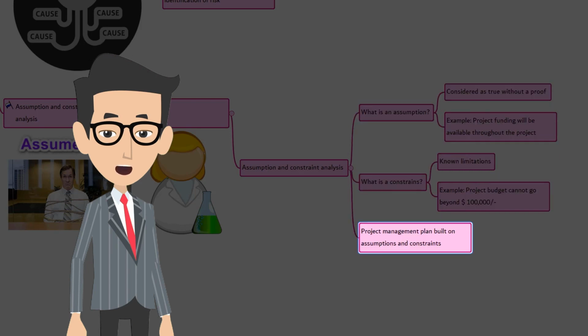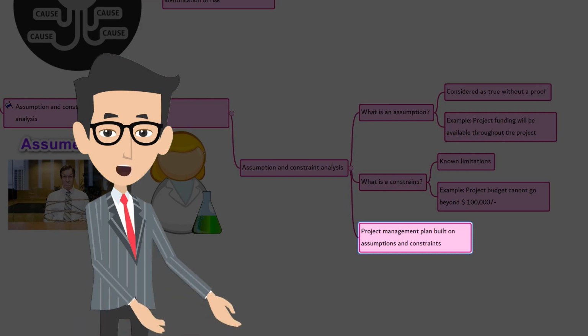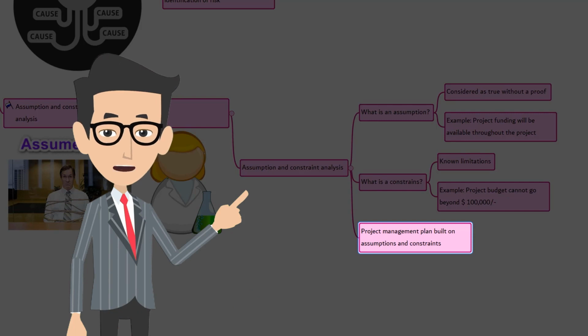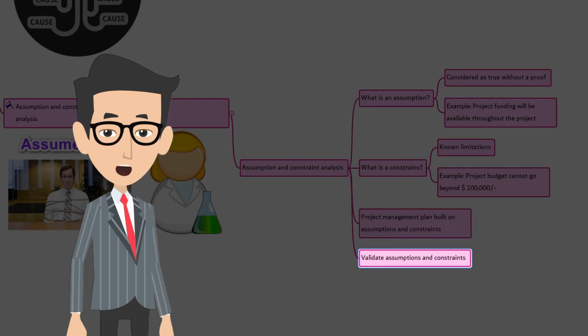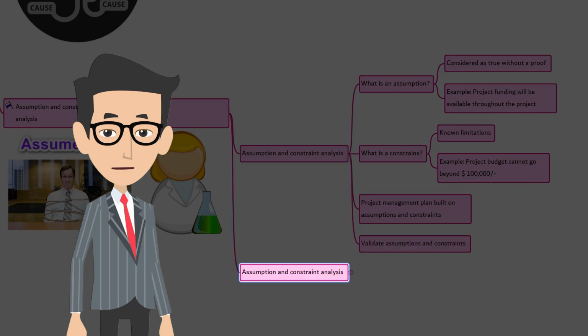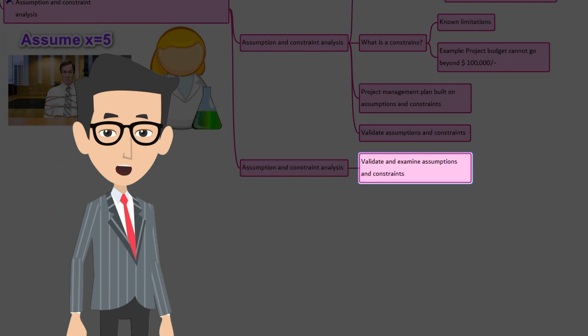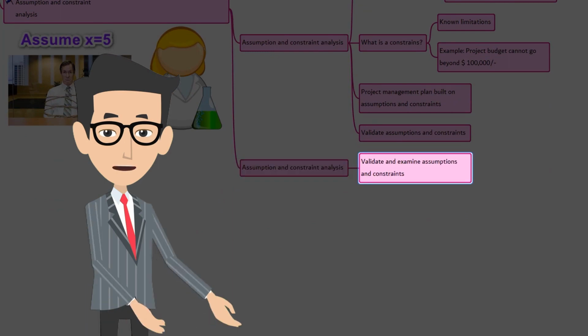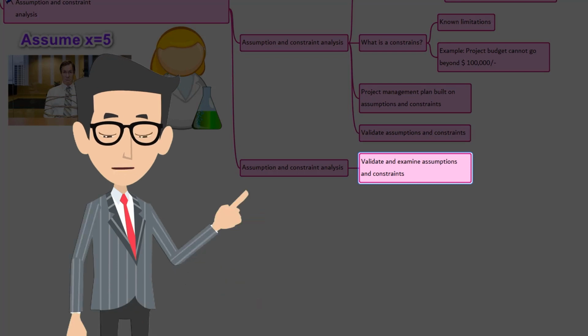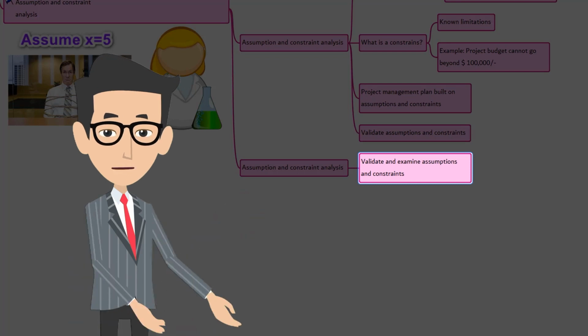Every project management plan gets developed based on a set of assumptions and a series of constraints. They are often incorporated as part of the scope baseline and project estimates. Validating the assumptions and constraints determines the risks in the project. Inaccuracy, inconsistency, instability, or incompleteness in assumptions may give rise to threats. Constraints may give opportunity by removing or relaxing the limiting factors. In context, validating the assumptions may lead to identification of threats. Schedule constraints and budget limitations are examined to determine the level of threat.